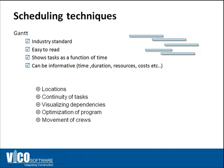They don't show locations, for example. They show locations only in the name of the task if you include it in there, or if you create your own location breakdown structure coding system and include it as a field in your Gantt chart schedule. It doesn't show continuity of tasks, does not allow you to visualize dependencies and optimize the movement of crews.